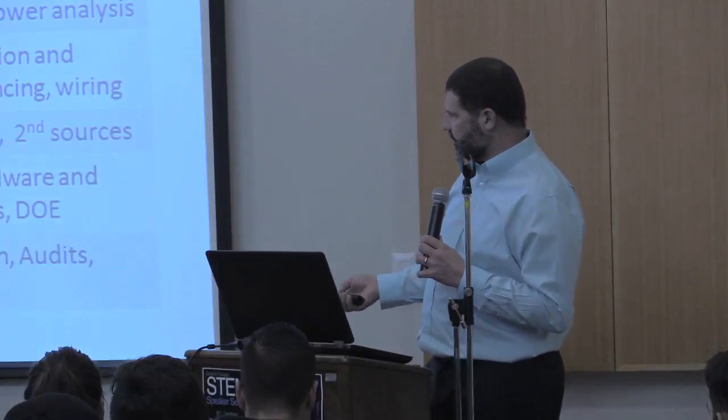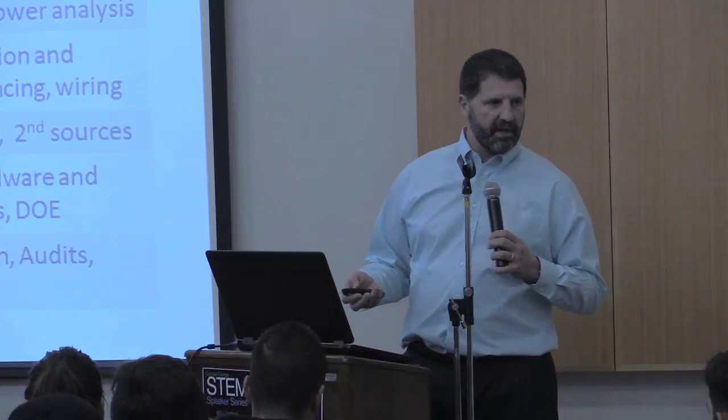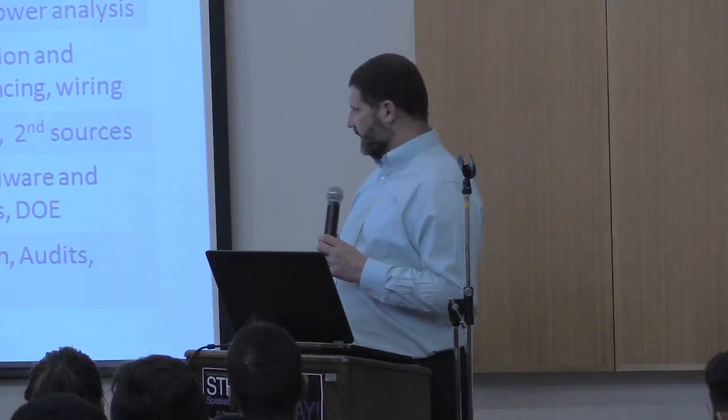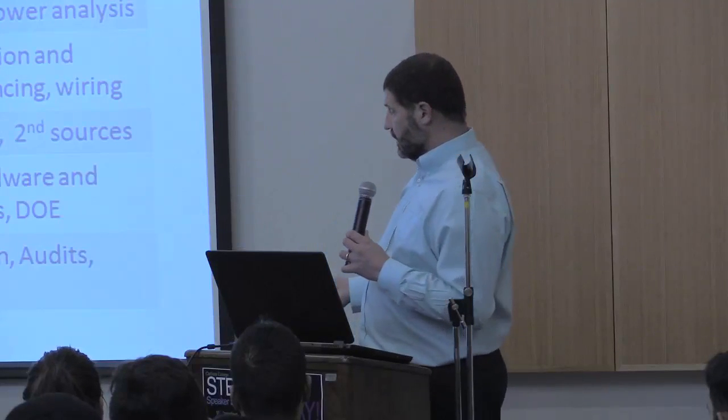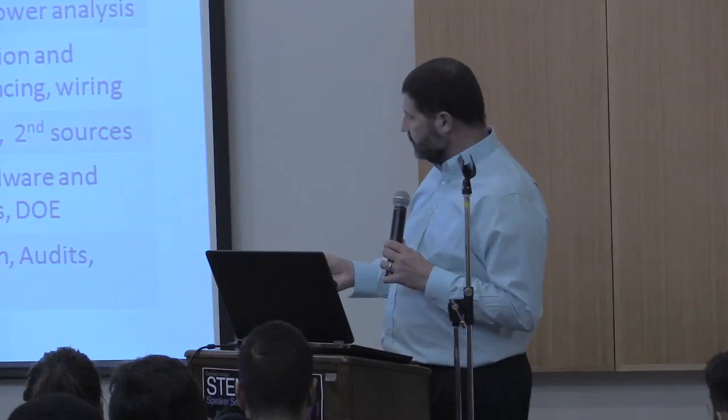They do audits on suppliers. They look at the risk in the supply chain, make sure that if that company has a fire, you can still build your stuff because you have another plant or you have another source for that product. And they also look at ways to reduce costs.